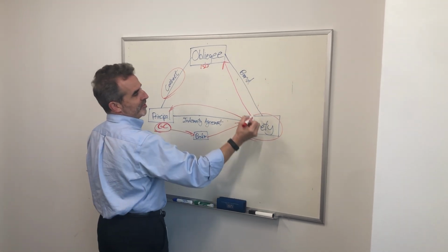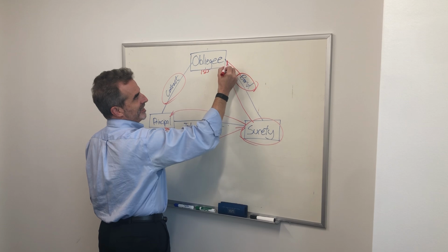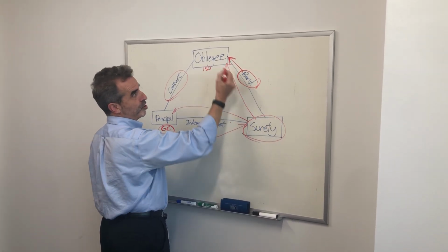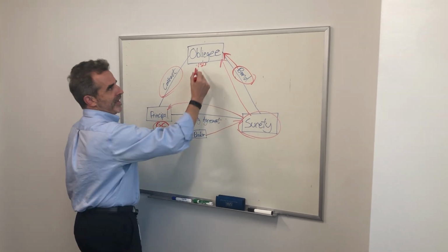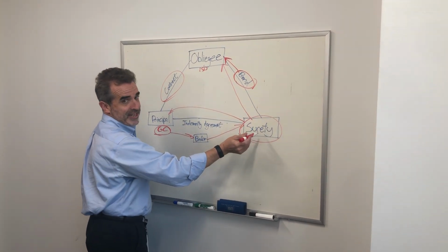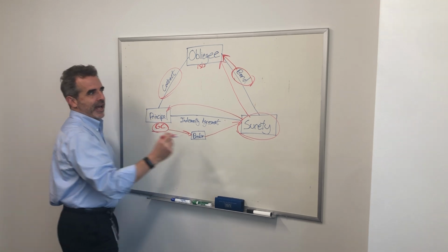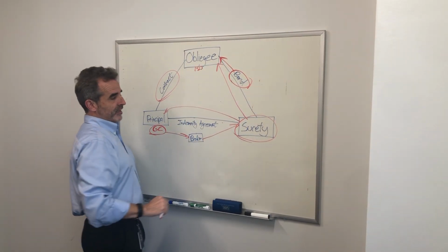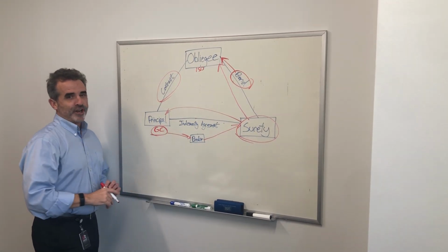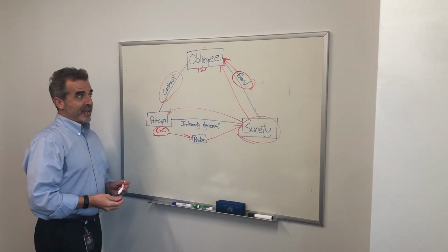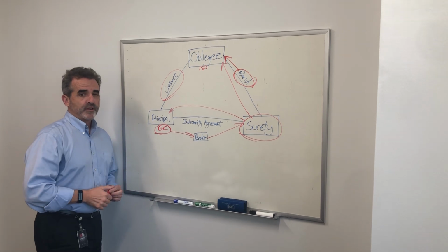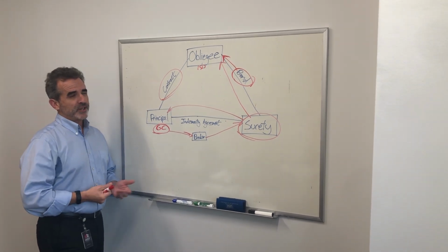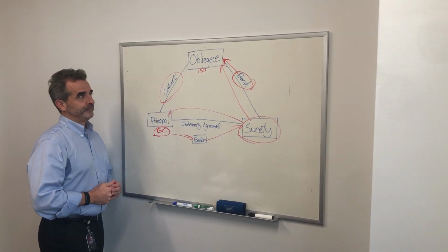The result, the actual bond, is sent from the carrier to the owner. And if something, God forbid, happens, they can call on the surety underwriter and the surety team to say, they failed, I need you to make sure this gets done. Now, there are a lot of different ways that gets done, and we'll talk about that in future episodes. But in essence, this is a three-party contract that is often used on governmental contracts, and can be used on private contracts, depending upon the nature of the owner.